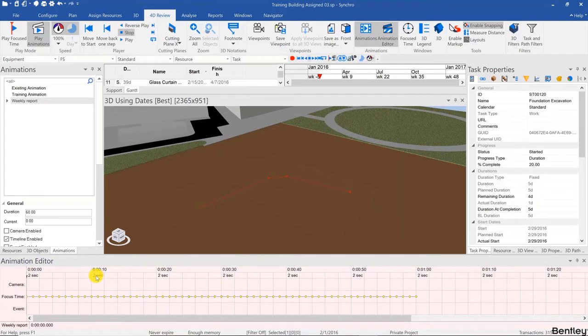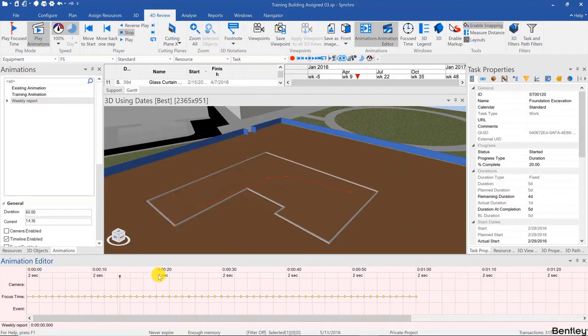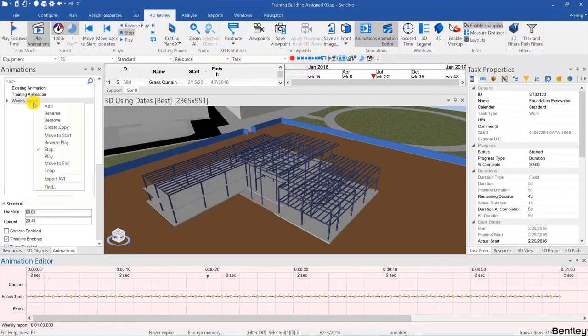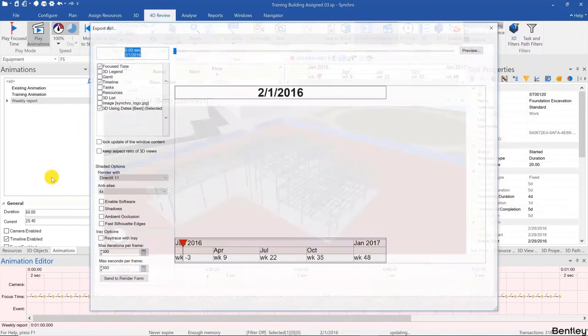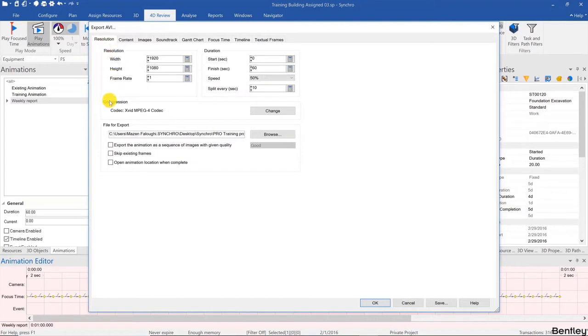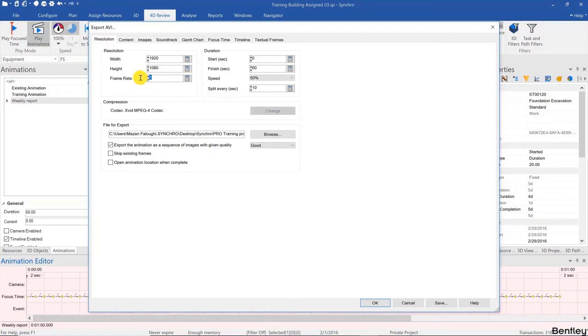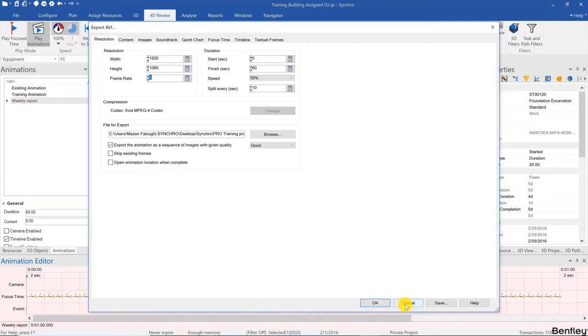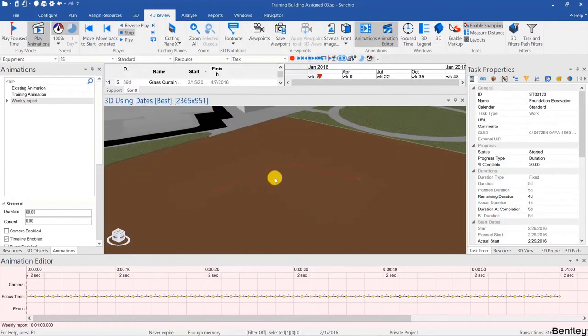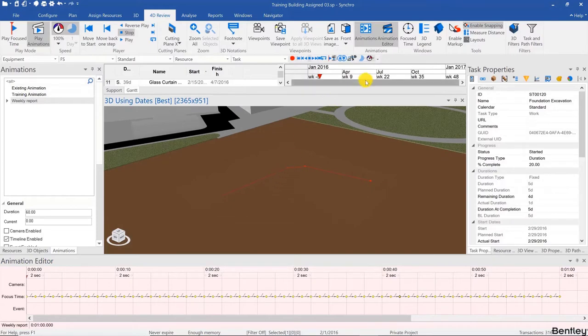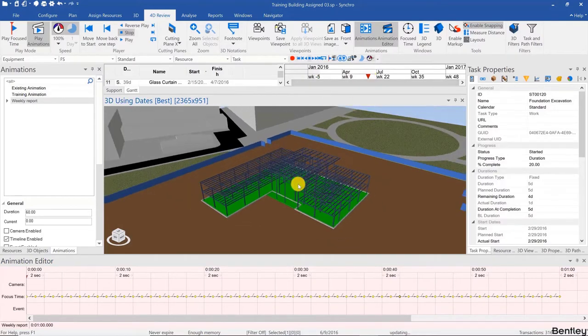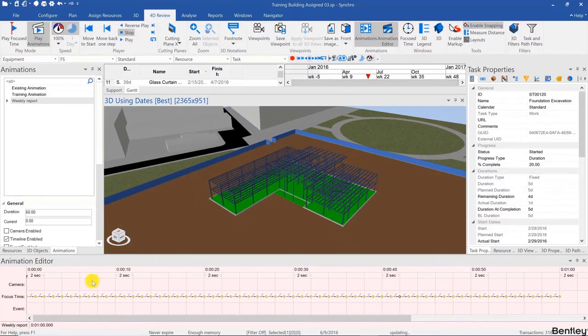It generates all of those keyframes, which are very important because when we generate our report, we're going to export the animation as a sequence of images with the frame rate at one frame per second. Since we have one frame per second and one keyframe per second, and each keyframe is generated on the first day of the week, this will be a weekly report. Before doing that, let's fix the camera angle. I'll just capture one camera keyframe.